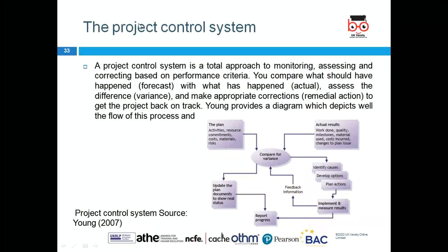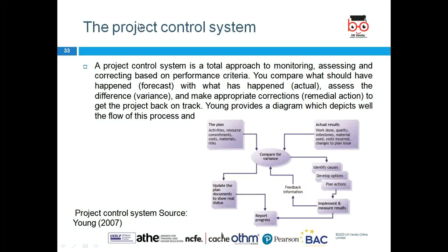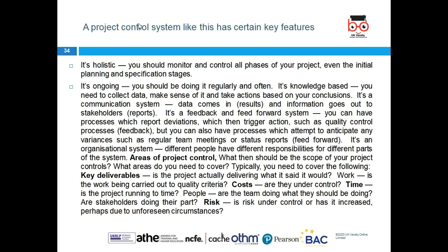So we'll do the plan, update your plan, and compare your variance with the actual, identifying the causes of variance. The variance between the budget and the actual result is a sort of control, and you identify what corrective action is required.